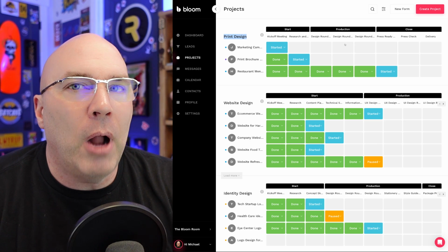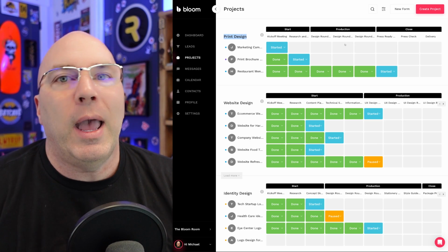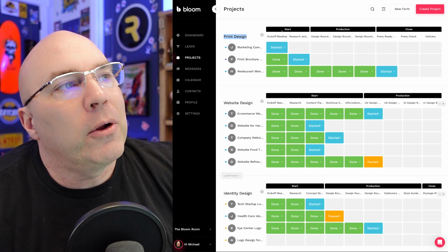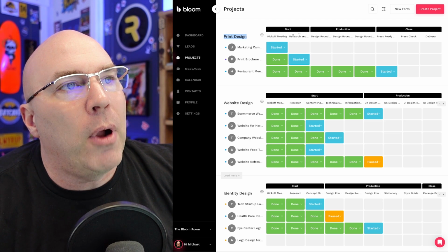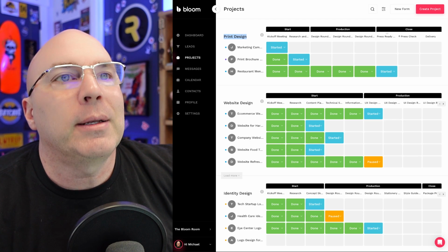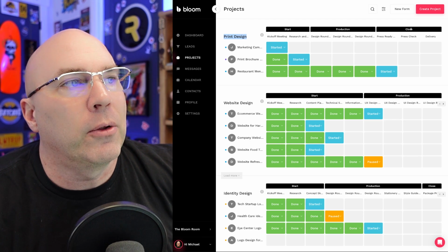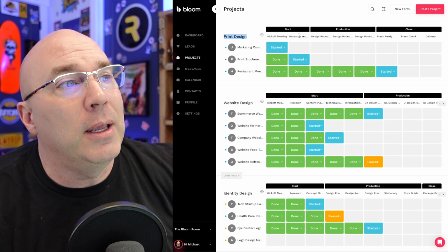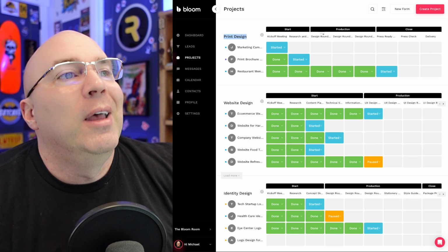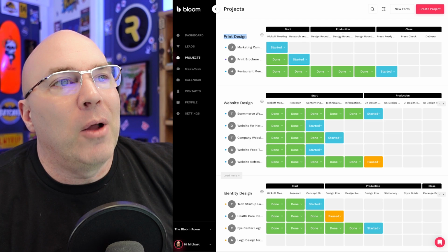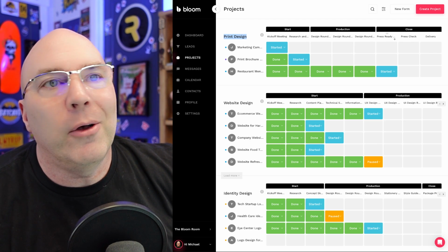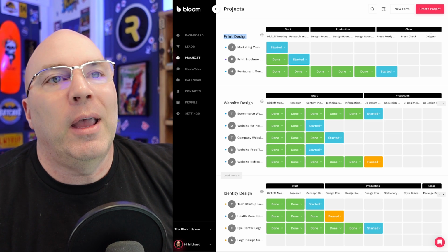And if you remember on my intro, we had all of the different buckets that happen for a project. I categorize these into the start of the project, the production of the project, and the closing of the project, or the completion of the project. So in the start, we're going to have a kickoff meeting, and we're going to do some research. In production, we're going to do design round 1, 2, and 3. And in close, we're going to do press ready, file creation, press checks, and delivery.